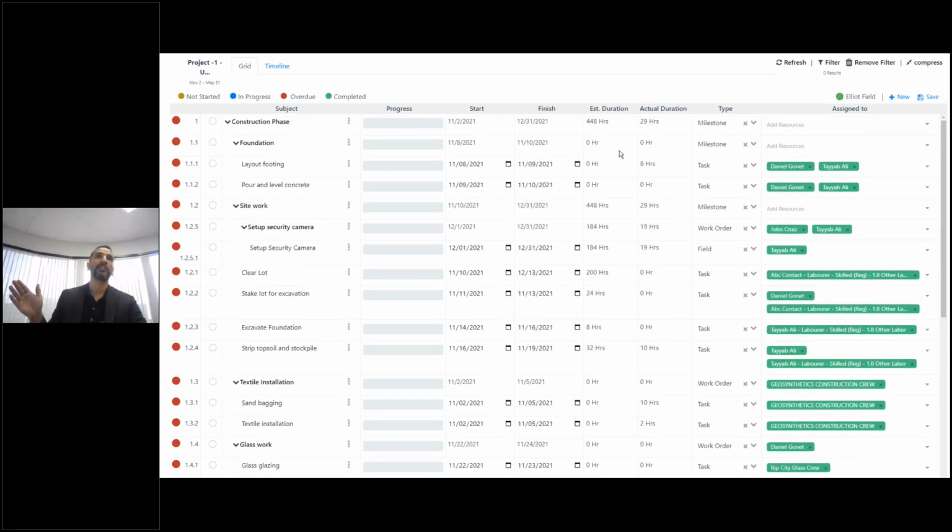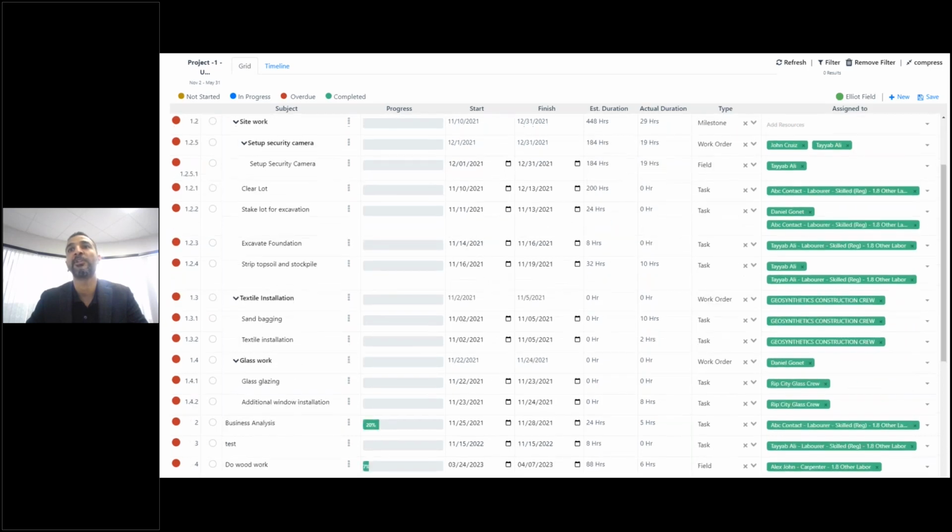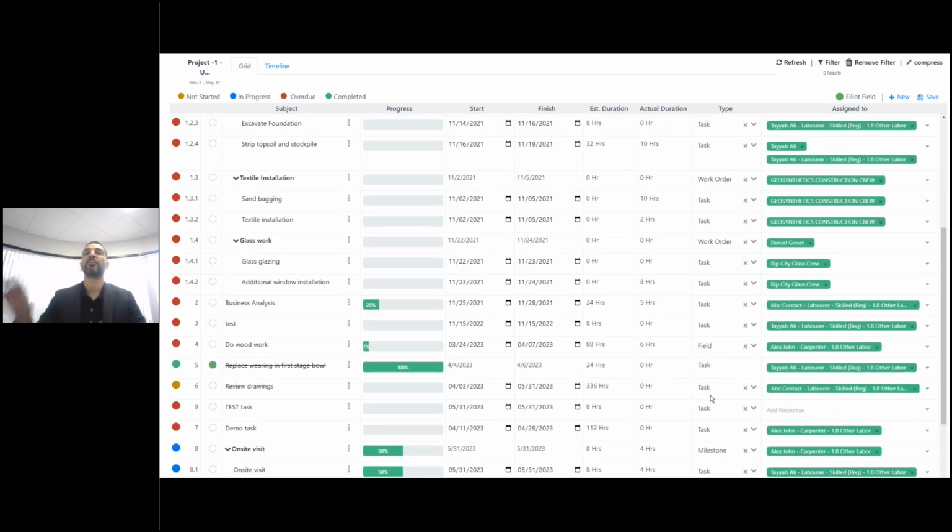You can do that. And when I was showing you invoice milestones, I showed you how you can pick your milestones, and it was allowing you to pick that list. So that list is coming directly from this schedule. Anything that is a milestone here or is tagged as a milestone becomes available to me in my contracts module, so I could pick those and I don't have to recreate them. But if I don't pick them, I can also create my own.